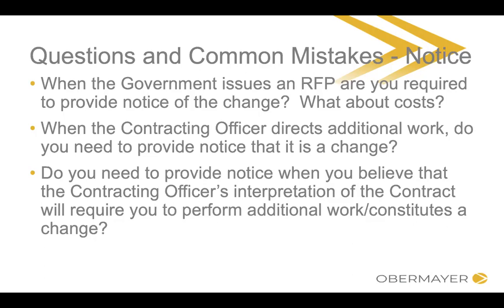change. Now, again, remember that you might need to, at the modification express change period, put together a cost proposal if you don't think you got paid sufficiently. So, you might still have to keep track of that 30-day period in that case, but no notice requirements per se.